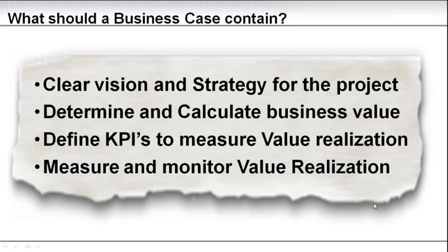You need to stick to the business case, and you need to raise it up to your executive management along the project if you see that the expected value that everyone expects when you're finished, the value that can be realized, suddenly changes and is not possible anymore because you've changed the solution, or you find out the solution cannot resolve the business problem anymore. You need to raise this up.